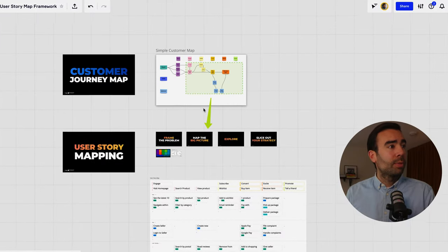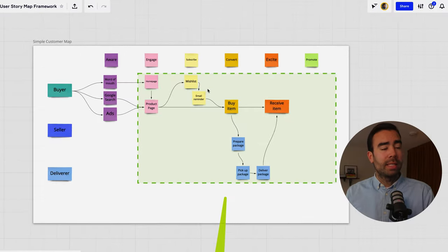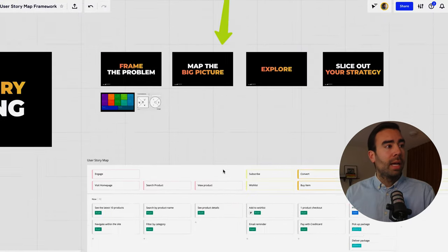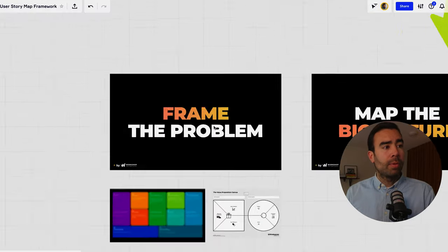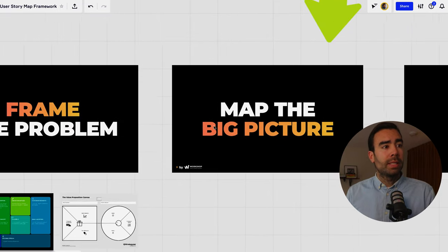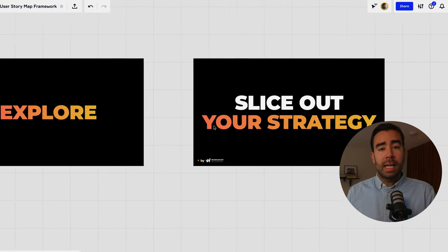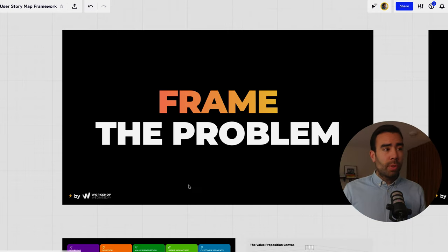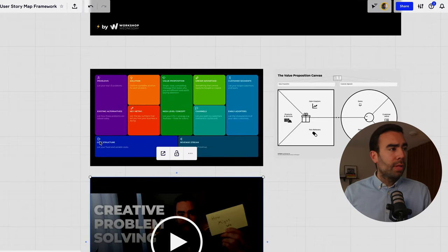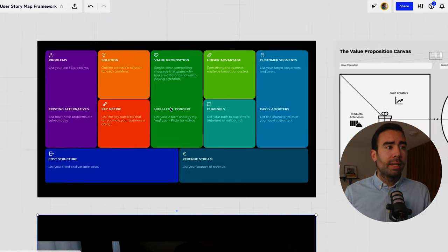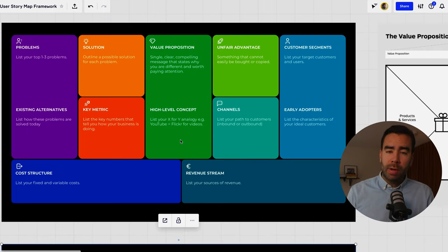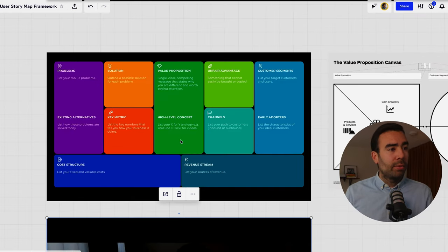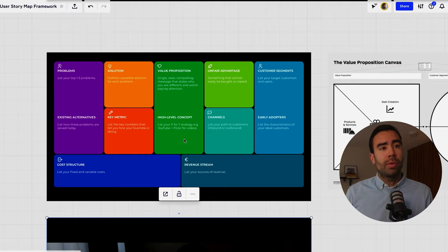Okay so there are four steps to get from a customer journey map like this to a user story map like this and those steps are to frame the problem to map the big picture to explore and then to slice out your strategy so you start with framing the problem and we have already done that in a couple of videos so for example you can use the lean canvas to frame your problem and this way you define your vision you also list your assumptions over there and it becomes easier to create your user story map.